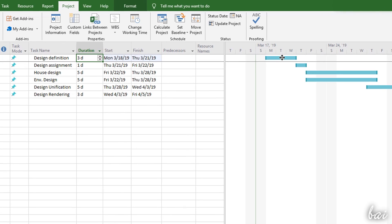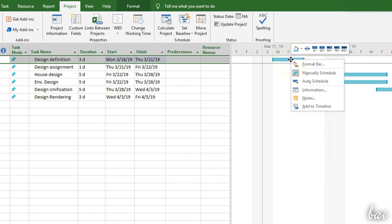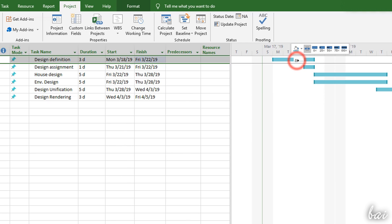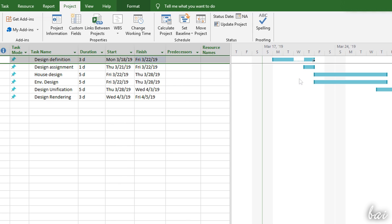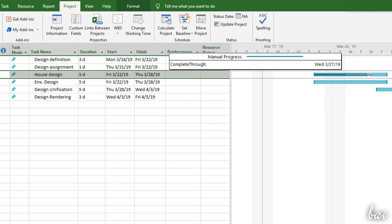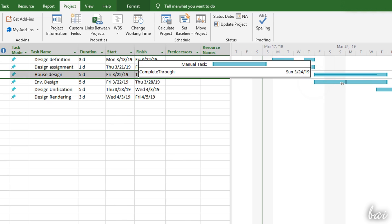You can split a task by right-clicking on it and going to Split Task. This splits the task in two independent parts, separated by a single day and without changing the task duration. This is used to free some working hours to dedicate to a more important task. You can also add the percentage of completion by clicking and dragging from the left edge of the taskbar. This is represented as a thin line progressing over the working days.